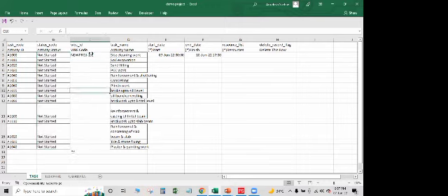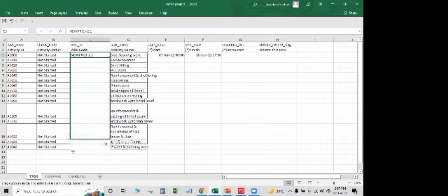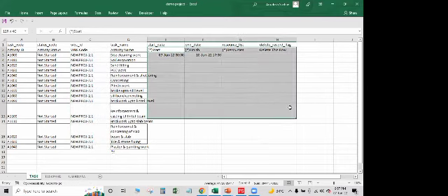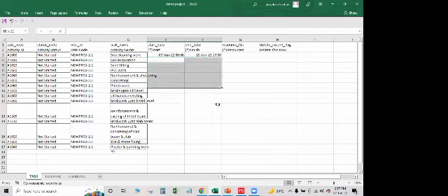Everything is not started, and for now I'm just putting all these activities under one WBS code only, on the same WBS code, sorry. And later on inside that I'll just copy them in the different places. Now all these things you don't need to put, as I told you before कि dates कुछ भी आपको नहीं रखनी होती हैं, relationship देनी होती है Primavera के अंदर, और आपको activities की duration देनी होती है, right? बाकी सारी जो चीजें हैं वो खुद ब खुद सॉफ्टवेयर करता है.